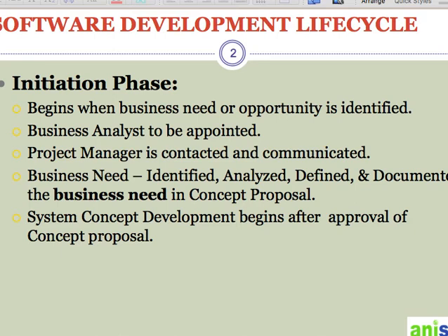Now, an impact analysis is done to understand the impact of the problem or opportunity on the overall business, to define future action. A project manager may be appointed at this stage to evaluate the feasibility of the solution, whether a possible solution can be implemented. If the solution is identified as doable, the project manager will present the estimation of the cost and the schedule of the new solution based on the high level requirement in terms of the features and functionality of the solution.